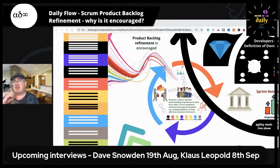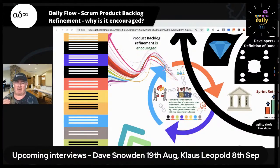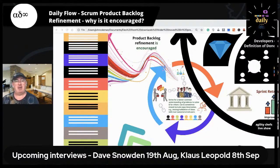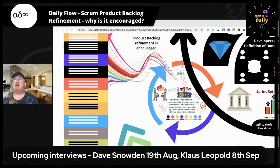So you're not arriving at sprint planning with your hands in your pockets, not really understanding what's coming up. You're almost bored with it — you're now getting into really specific details and examples you want to nail in the next sprint. I highly recommend it. I've worked with lots of teams, and through some studies I've noticed that teams who do very good backlog refinement have a high correlation with performing well. They have more successful planning because they better understand what problems they're trying to solve, they tend to deliver on their sprint goals, iterate towards their product goal, and have better engagement with stakeholders and better support from management.